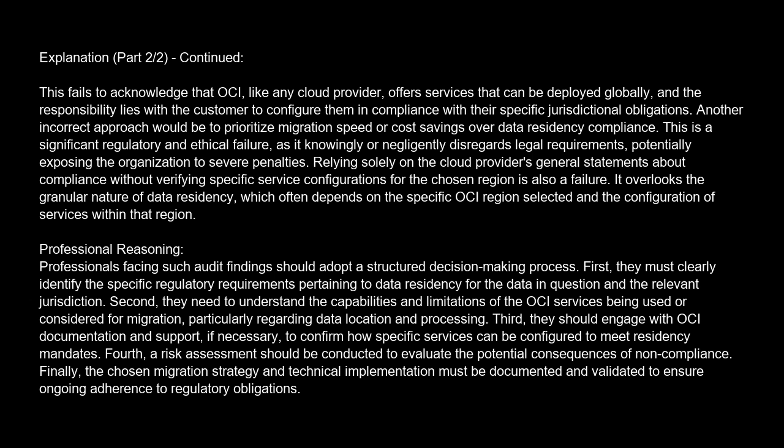Professional reasoning. Professionals facing such audit findings should adopt a structured decision-making process. First, they must clearly identify the specific regulatory requirements pertaining to data residency for the data in question and the relevant jurisdiction. Second, they need to understand the capabilities and limitations of the OCI services being used or considered for migration, particularly regarding data location and processing.